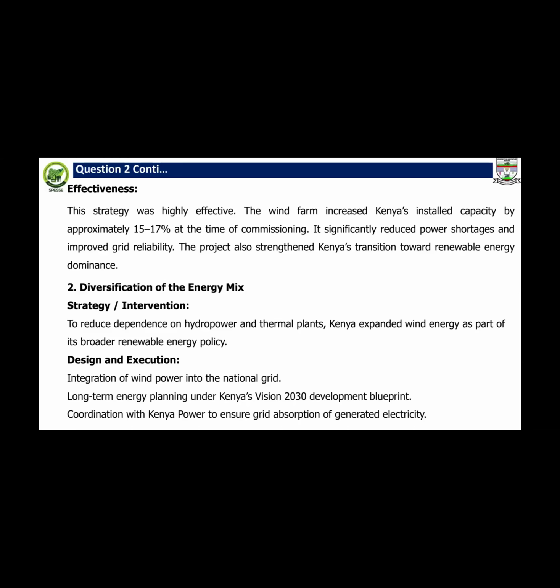To reduce dependence on hydropower and thermal plants, Kenya expanded wind energy as part of its broader renewable energy policy. The design and execution: integration of wind power into the national grid, long-term energy planning under Kenya's Vision 2030 development blueprint, and coordination with Kenya Power to ensure grid absorption of generated electricity. Next slide, please.